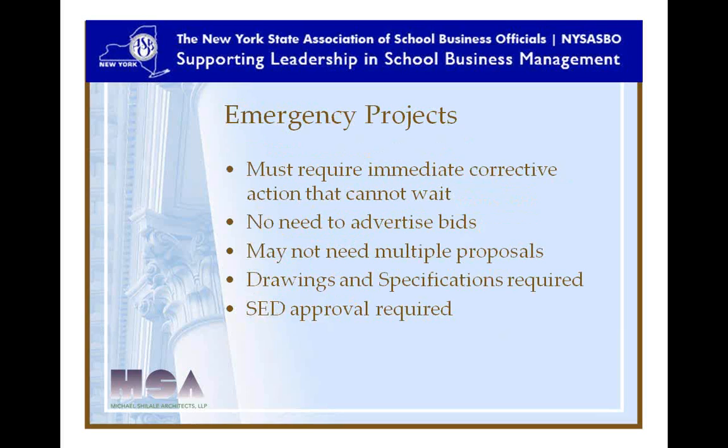So let's talk a little bit about emergency projects. They do happen. SED does not like to see too many emergency projects get submitted. Sometimes districts use this tool as a way to expedite the SED process. So they issued some edicts in the past few years saying they're going to look much more closely at what you consider an emergency project. It's an item that must require immediate corrective action that cannot wait.